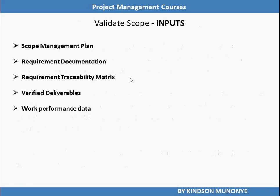Let's now discuss some of these inputs. One of the inputs to Validate Scope is the Scope Management Plan. The Scope Management Plan defines how the scope will be managed, how the scope will be controlled and defined. Why do we need the Requirements Documentation for Validate Scope? Because this documentation lists all the project, product, and other types of requirements for the project and product along with the acceptance criteria. For the product of the project to be accepted, there must be criteria to be measured against, and this information is contained in the Requirements Documentation. The Requirements Traceability Matrix is necessary because it links requirements to their origin and tracks them throughout the project lifecycle.